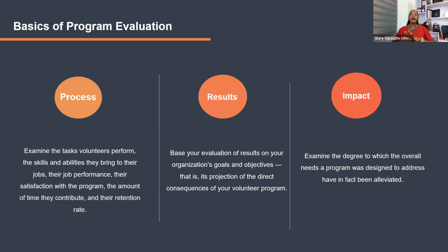And so this young couple waited, and for 6 months, he observed that there's been a change. Out of about 100 pregnant women that came there to deliver, there was an 80% decrease in maternal mortality. It means that 80% of the people were left there in good health with their baby. In the previous scenario, it could have been 50%, the others would have died. Now, that's an impact, because it means that your training has led to a decrease in maternal mortality.